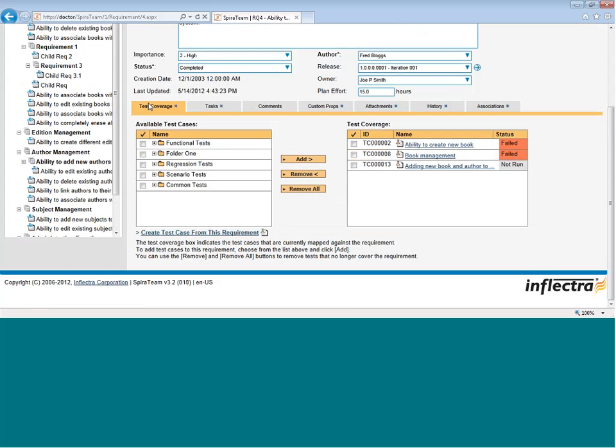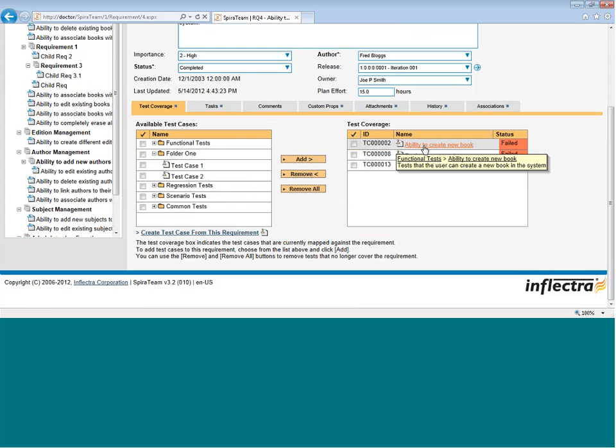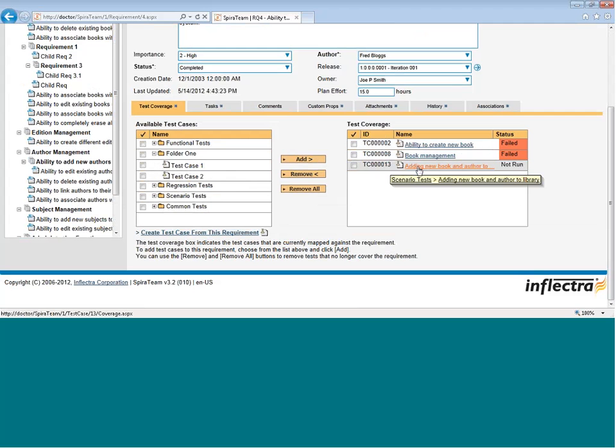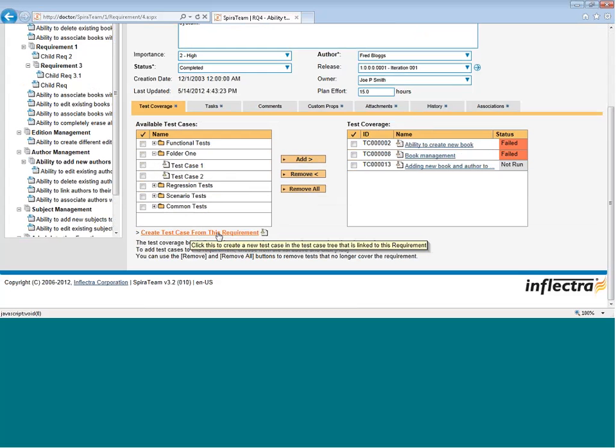As well as that, you have all the same standard fields we saw on the previous page, but there's also some additional tabs. For example, on the Test Coverage tab, you can expand the Test Case tree to see all the test cases in the project that could be mapped to this requirement. And on the right-hand side, you can see the test cases that already are mapped to the requirement. Any test case in this right-hand box marked Test Coverage is a test case that has to be passed for this requirement to be considered fully tested. If you have a brand new requirement that doesn't have any test cases that are associated to it yet, you can also create a new test case directly from the requirement using this shortcut.